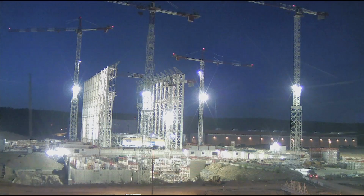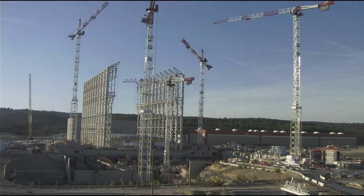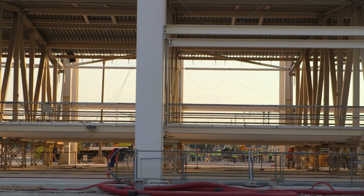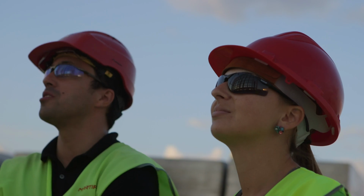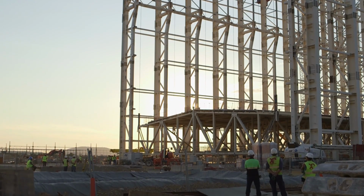The day before, the structure had been carefully lifted a first 20 centimeters and left pending overnight, allowing the lasers to measure any deflection of the steel and to check the hydraulic pressure in the jacks. Slings still secure the monster on strings should the wind pick up.